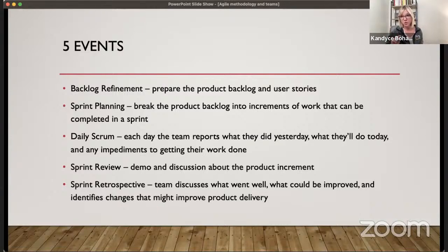And we also always try to have the customers or key stakeholders in that sprint review so that they can provide feedback on what you've done. So it's not just rush through and let me show you a thing. That conversation part is really important because we need the feedback to go back into our next sprint so we can make sure that we're still building the right thing.